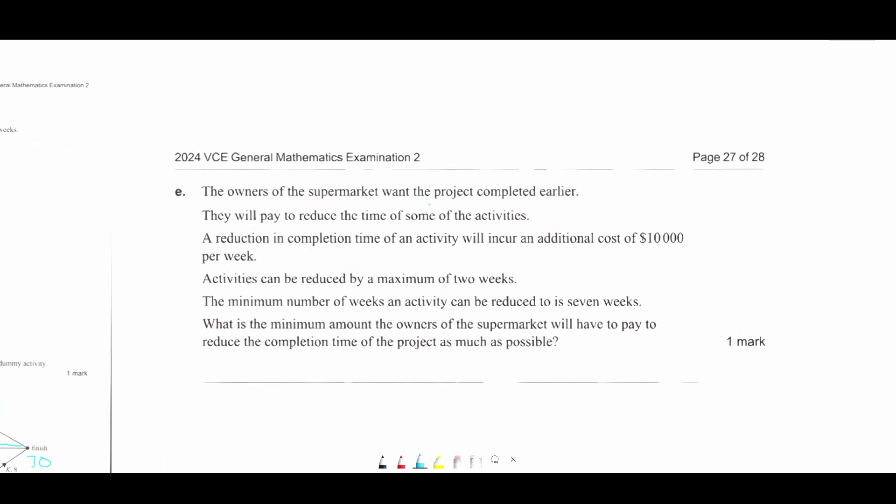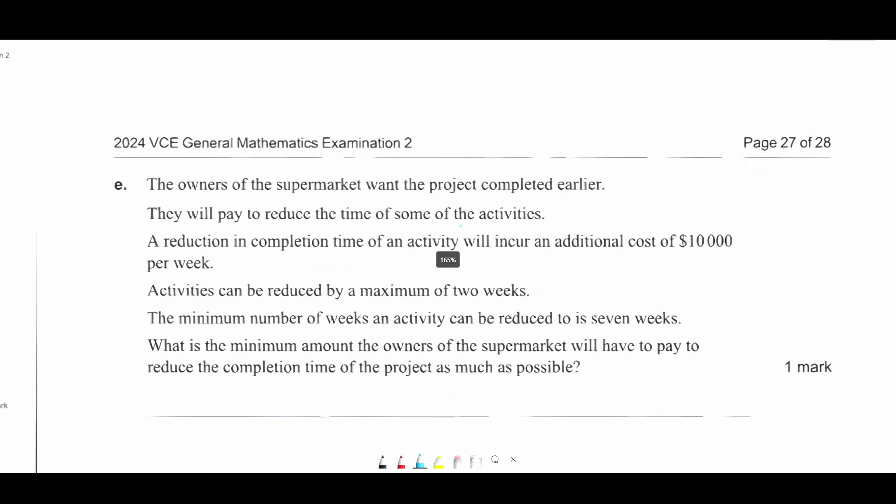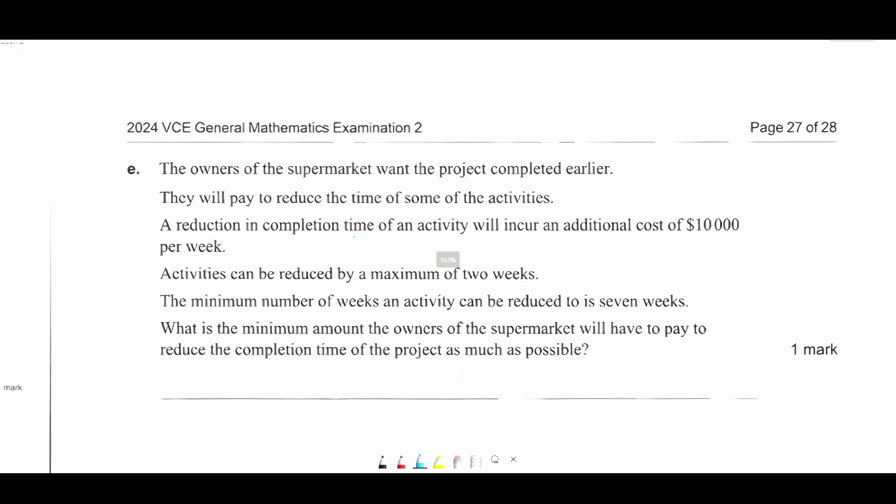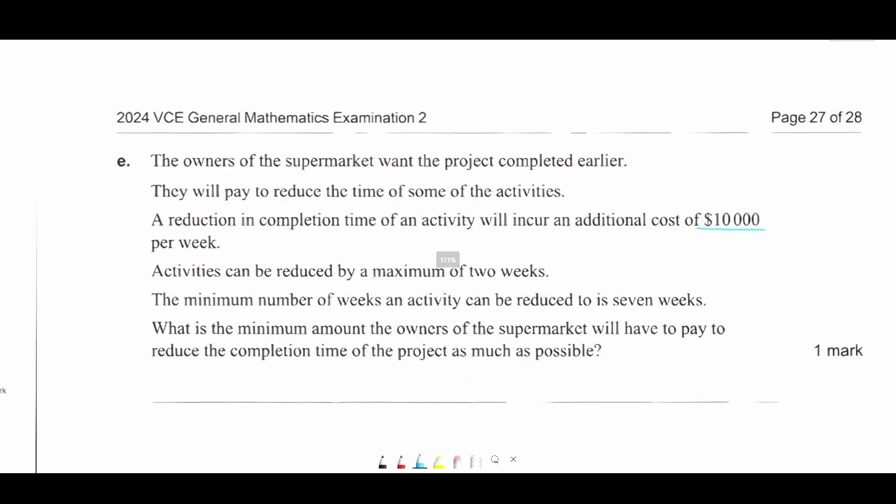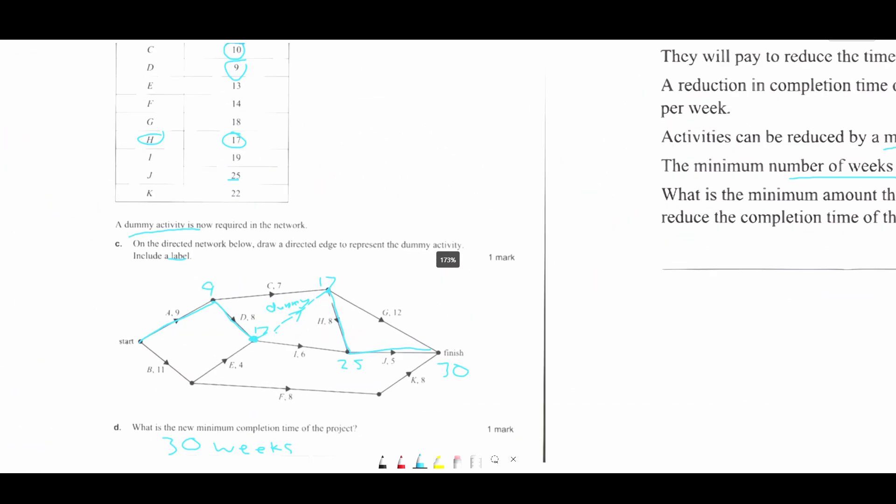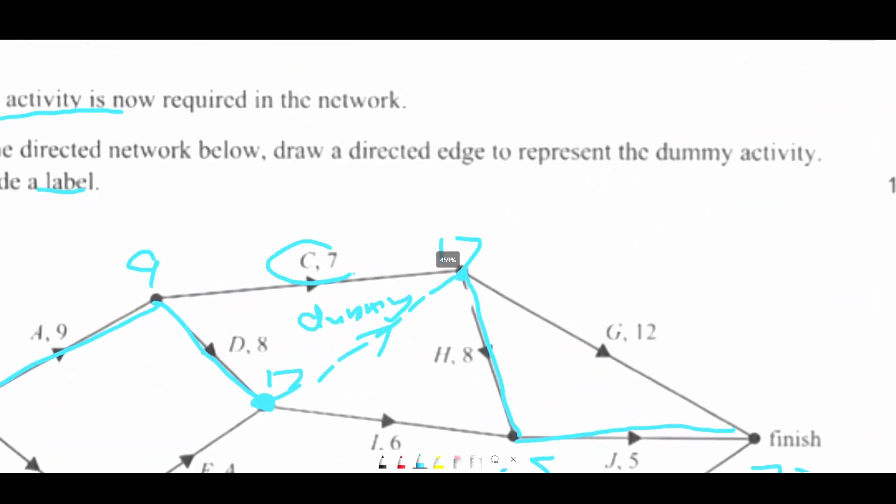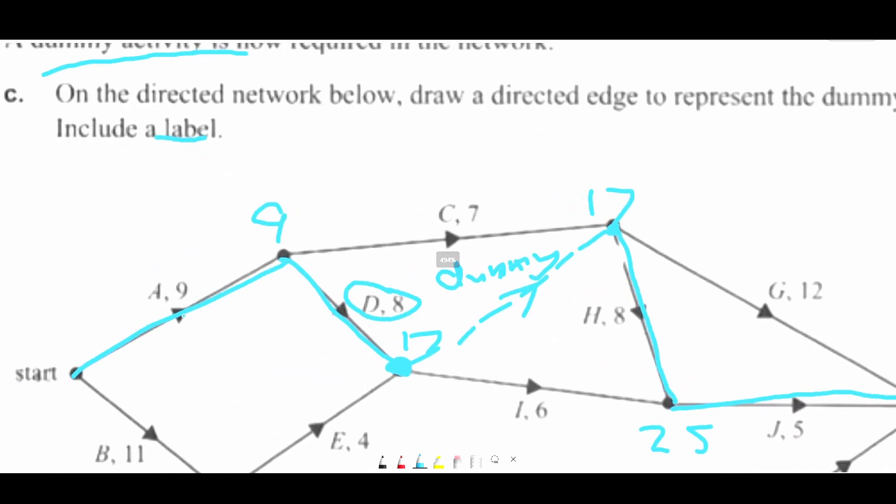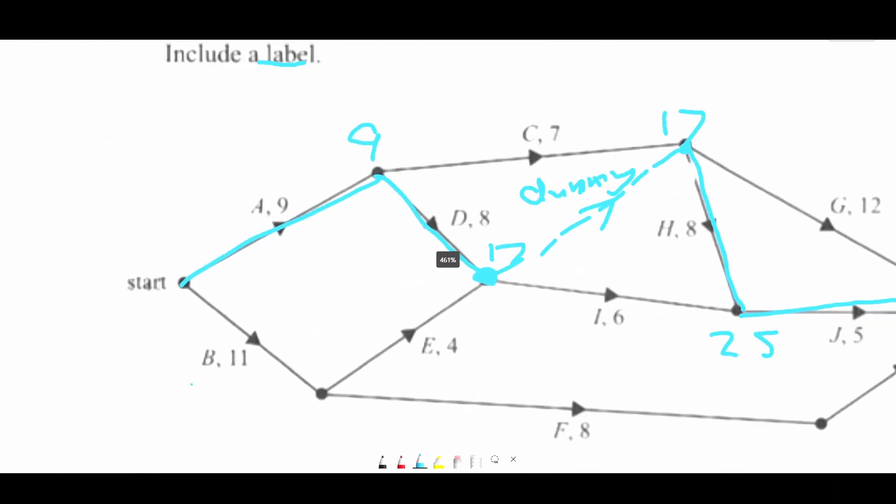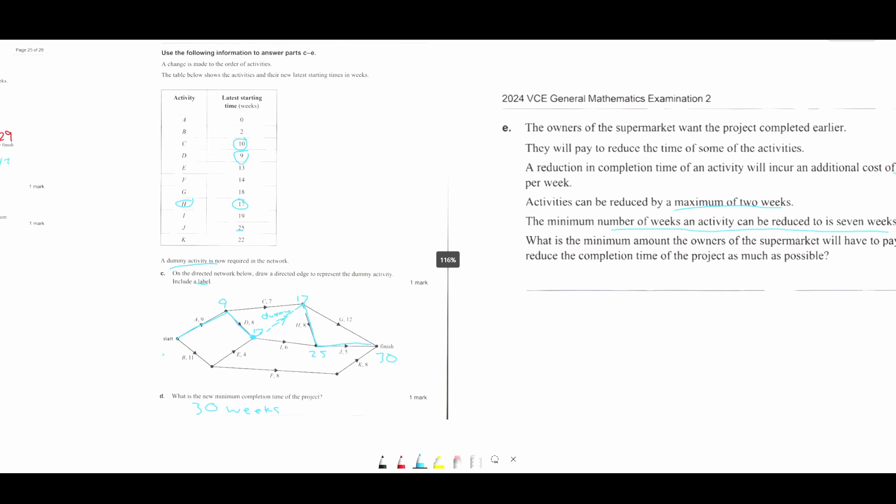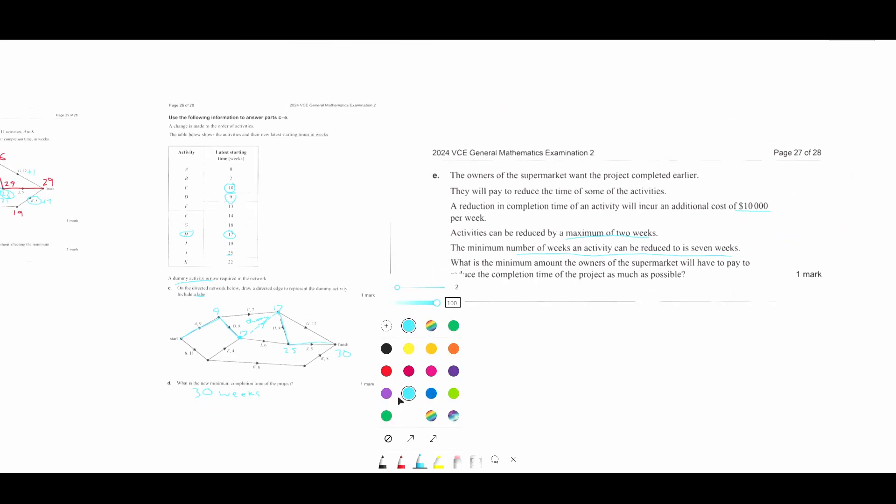The owners want the project to be completed earlier. They will pay to reduce. A reduction in completion time of an activity will incur $10,000. Activities can be reduced by a maximum of two weeks. The minimum number of weeks that they can be reduced to is seven weeks. So that means we can't reduce this one. We can reduce this one to seven. We can reduce this one to seven. And they can only all be reduced by two weeks. I'll use a different color. I'll use purple and I'll make it smaller.